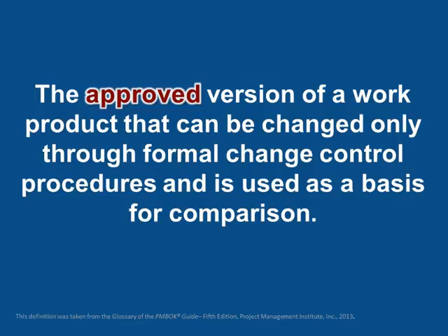It's important to understand that a baseline is an approved plan for a project, plus or minus approved changes. When you originally plan your project, you draw a line in the sand and provide an estimate of what the budget or the schedule are going to look like at a point in time. As the project progresses, things change. New information becomes available. As circumstances change, you may need to change your baseline, which we call rebaselining, but only if you receive approval for the proposed changes.